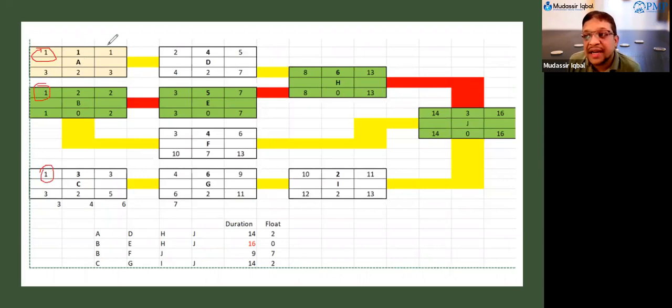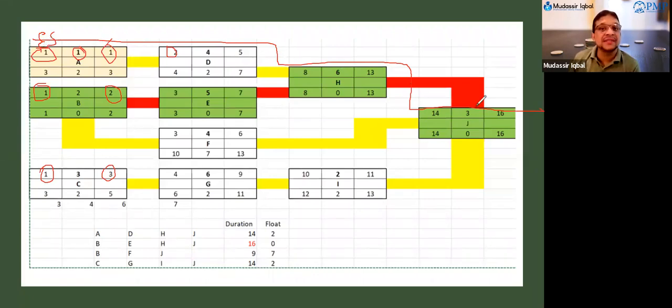And then we say 1 day need, 1st of January finish, 2nd of January finish, 3rd of January finish. This is called early start. This is 1 day activity. This is a 4 day activity. Start on 2, finishes on 5th. So once we were doing a forward pass, we were filling this top row. Now we know the end date. So now based on end date, we start doing the backward pass, 16 to 14.